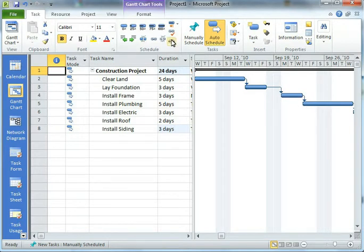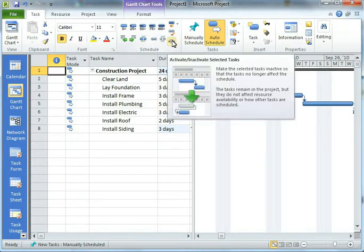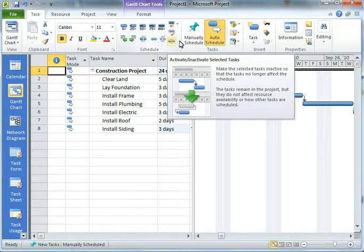We couldn't just do it for a single activity. Well, with the Inactivate Task option, we can. We can do it for a single activity.